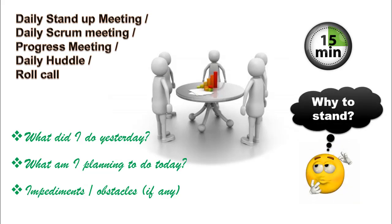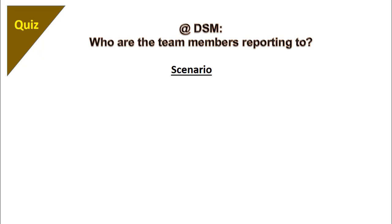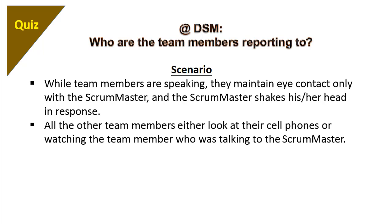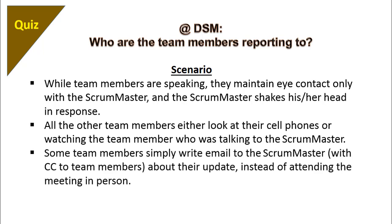Is it important to stand up in the meeting? Standing up and talking gives a sense of urgency because the meeting should be finished in 15 minutes. Some teams do it like chai pe charcha, meaning conducting the meeting over tea or coffee. At a daily stand-up meeting, in the following scenario, tell me who the team members are reporting to. While team members are speaking, they are maintaining eye contact with the scrum master and the scrum master notes in response. All the team members either look at their cell phones or watch the team member who is talking to the scrum master. Some team members simply write email to the scrum master with copy to all team members mentioning their updates instead of attending. All these things are indicative of a non-collaborative environment and the scrum master being process owner is responsible for correcting it.